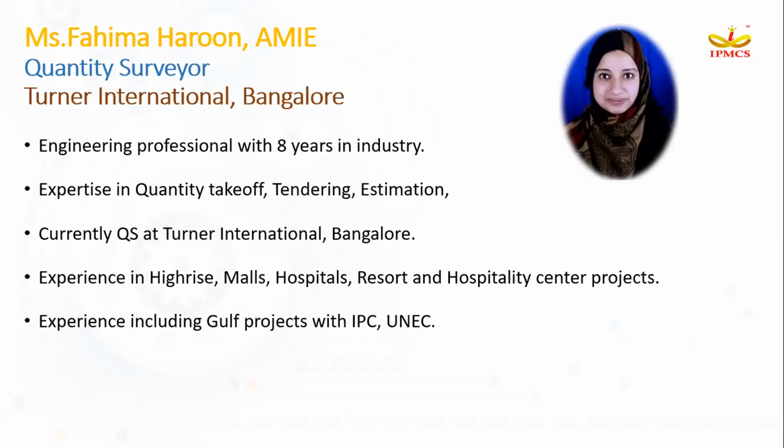See, for example, if we take a project where there is a revision, naturally when there is a tendering process, there's lots of revision happening. So when there is a revision of a project cost or a drawing, we had to remeasure and start from scratch for the Excel sheet, which usually takes a week to a month, particularly for larger and complex projects. But using Costex, I can say it is saving nearly 50 to 80% of the time. In some cases, it saves nearly 80% if it's a small project.